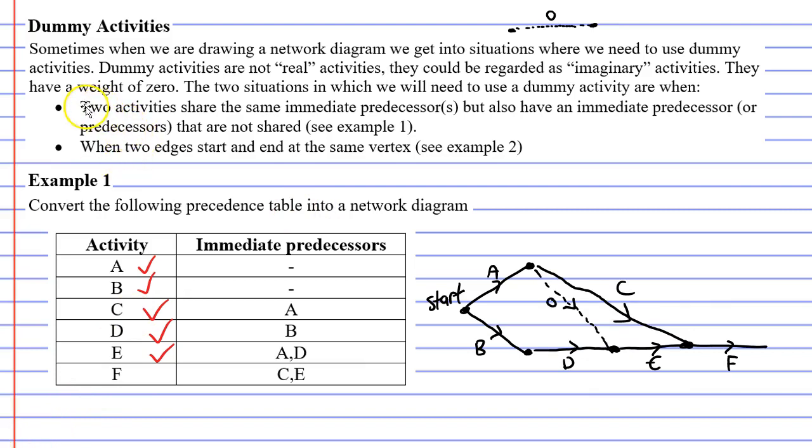Now let's go back to that dot point that we mentioned here. We said if you look at example one, you will see that you will need a dummy if two activities share the same immediate predecessor or predecessors, but also have an immediate predecessor or predecessors that are not shared. You will see this when we look at activities C and activity E.